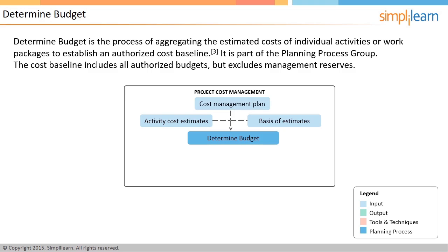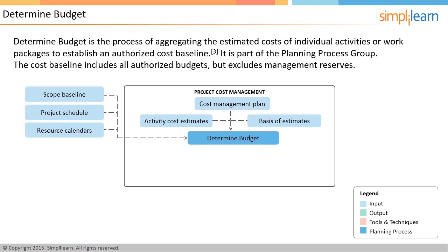The cost management plan lays the framework for the cost management processes in the project. It provides guidelines such as the budgeting cycle, tools and techniques used to prepare and approve the budget, etc. In addition to these two important inputs, scope baseline is also looked at. Project schedule provides aggregate cost in a particular calendar period to ensure how much money can be made available during that time. Similarly, resource calendar provides information on the resource, which is assigned to the project at a particular point of time. This information is then used to indicate resource costs over the duration of the project.